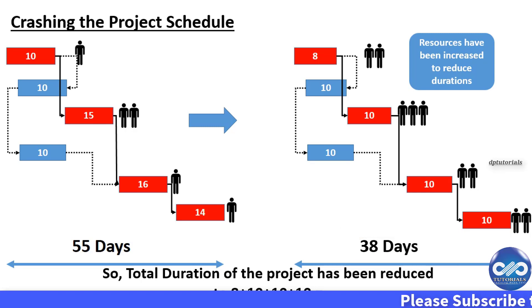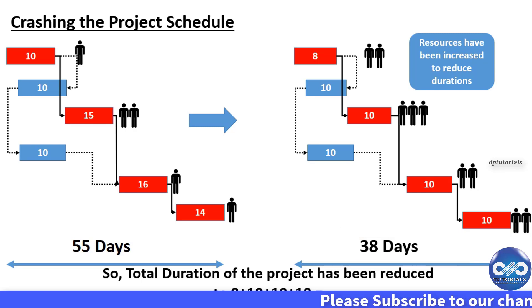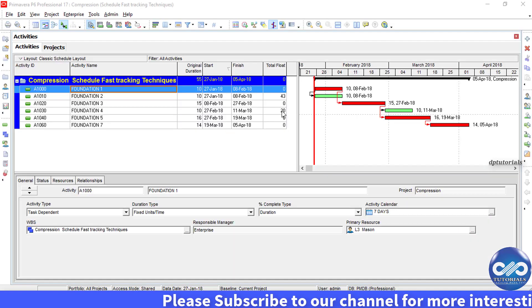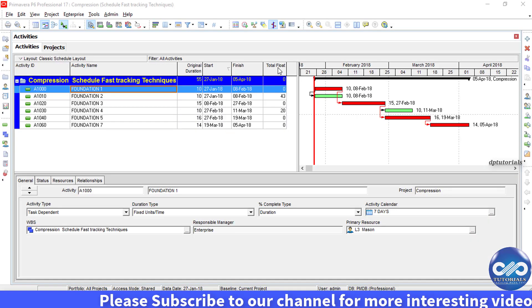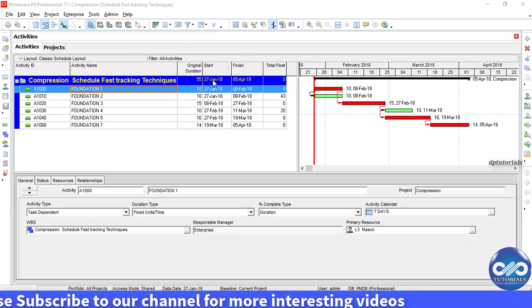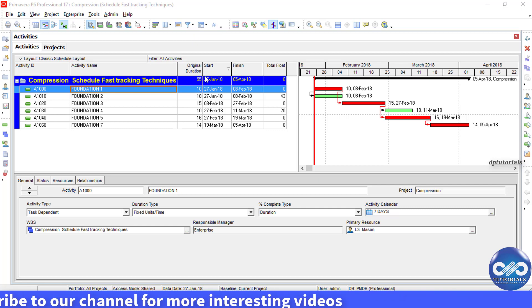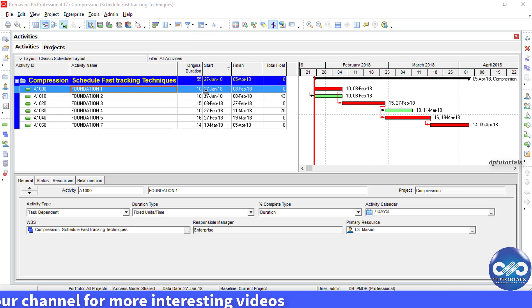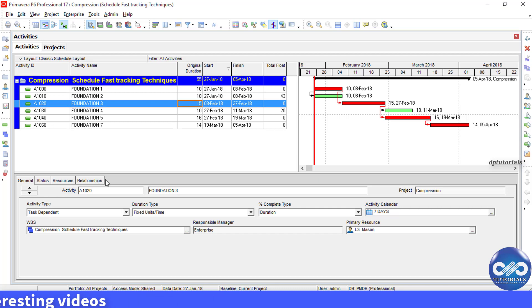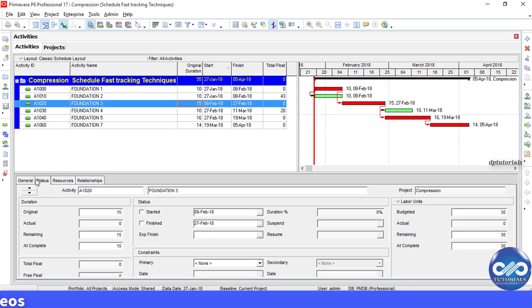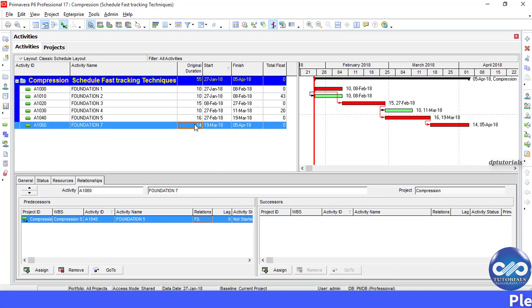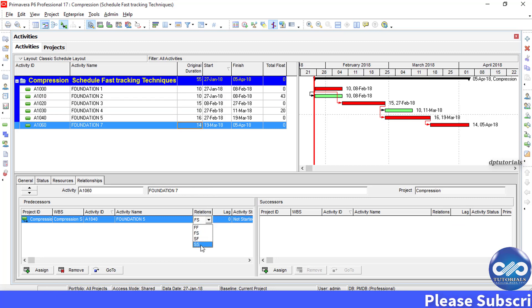Now let's see an example of this in Primavera software. Here I have already opened a schedule. You can see the total duration of the project is of 55 days. To fast track the project, we need to change the relationships as discussed to carry out the critical activities in parallel. Now I am making the changes to start to start relationship rather than finish to start.